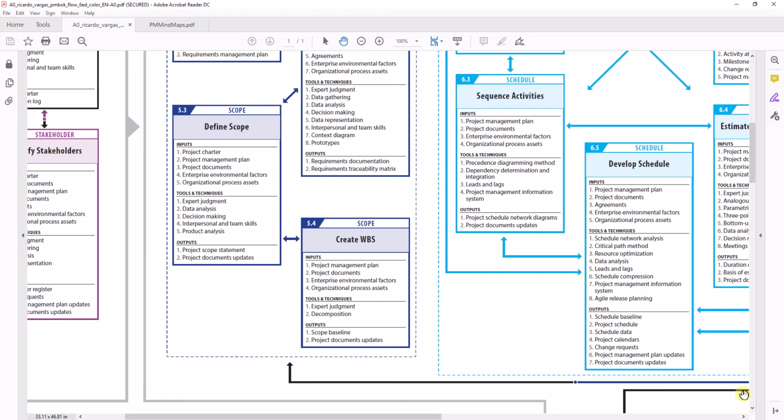You collect only the sales team, only the software guys, database guys. It could be department by department, or people who worked in the previous projects. You don't collect all the people in one area. Rather, you focus your attention on select groups of people who can bring in their own experience and expertise, and then you moderate discussions. This is called a focus group.